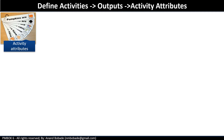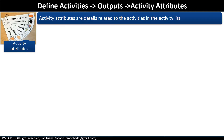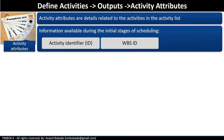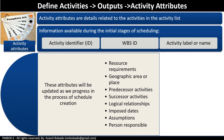Activity attributes are details related to the activities in the activity list. Initially, we have attributes like activity identifier, work breakdown structure ID, and activity label or name. Additional attributes will be updated as we progress in the process of schedule creation — such as resource requirements, geographic area or place, predecessor activities, successor activities, etc.